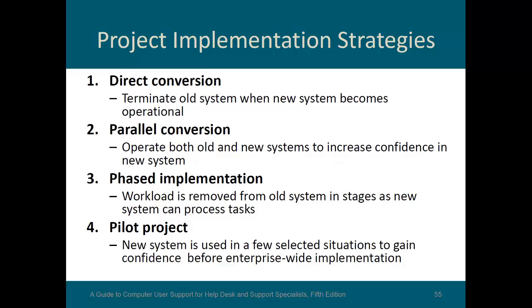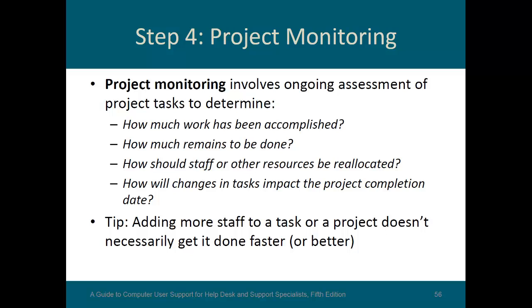Phased implementation, workload is removed from the old system in stages as new system can process tasks. That doesn't always work based on whether you're going to a completely new system or just upgrading an old one. And a pilot project, of course, using a few selected situations to gain confidence before enterprise-wide implementation.